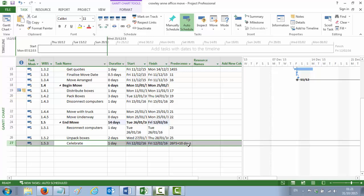Notice now your predecessor column says it follows with a finish-to-start, and there's a plus 10 days — meaning nothing happens for 10 days, there's a lag before the activity starts. So those are points number 8 to 13 on your Office Move example: attaching a note, entering a recurring task and moving it, linking your tasks with predecessors, linking tasks that don't follow the task ahead of them, putting in a start-to-start relationship, adding a constraint of a particular date, and finally putting in a lag.